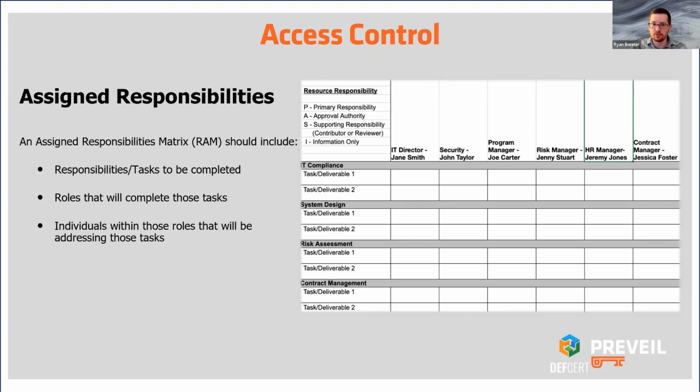But one of the top level design principles that goes into our implementation is separation of duties, right? So, if I've got a way to matrix out, here's a responsibility that should be kept separate from that one, let's get those assigned out to different individuals in our list, or different teams or departments, depending on how big the team is that's doing the overall work. That could be huge. And then starting to build out some sort of rudimentary responsibility matrix for who's going to tackle that issue primarily, who's going to support that. You might call that a RACI chart, you might call that a PASI chart, whatever allows you to show how people are going to be involved with each other in performing that work. I think that's valuable too.